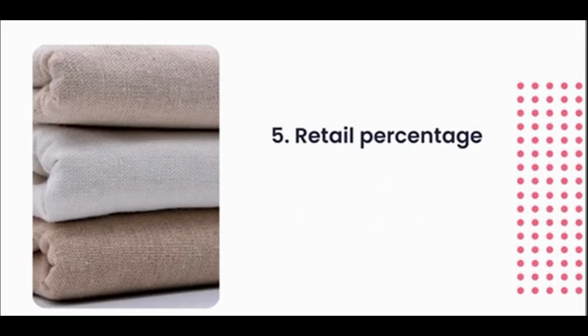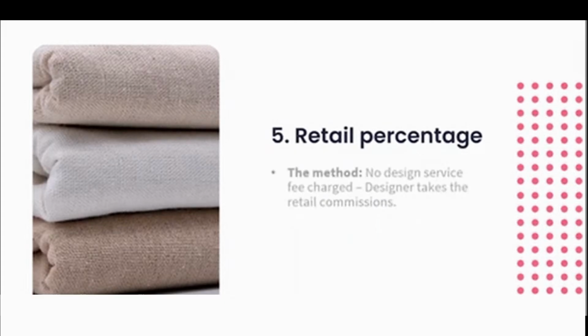Next, we've got our retail percentage or percentage method. Instead of charging a fee for a design service, the stated retail price from the retailer is charged to the client, and the interior designer's payment comes from the discount given. So remember when we were discussing the showrooms and I mentioned that generally as designers we get a designer discount? Well, that is where this will apply. So just to summarize, if you went and bought a table for a client, say the table cost you 100 Rand or $100, your kickback or your designer discount was $20, you would still charge the client the $100 and your fee for this service would be the $20. So you would be working on percentage and commission.